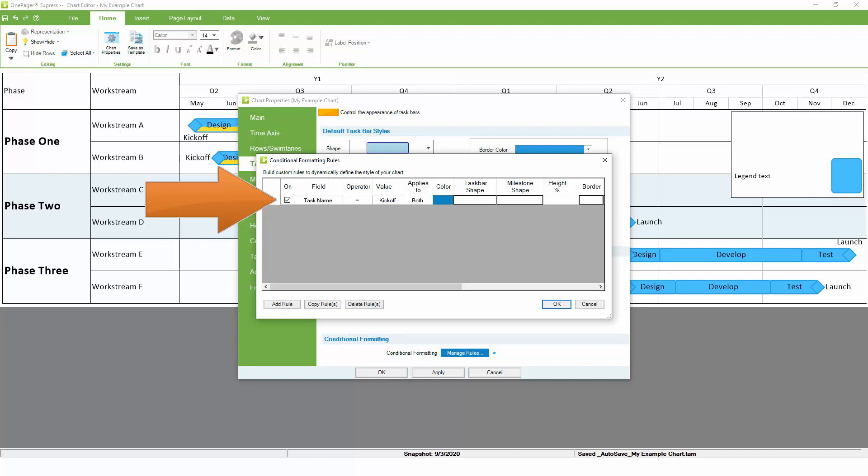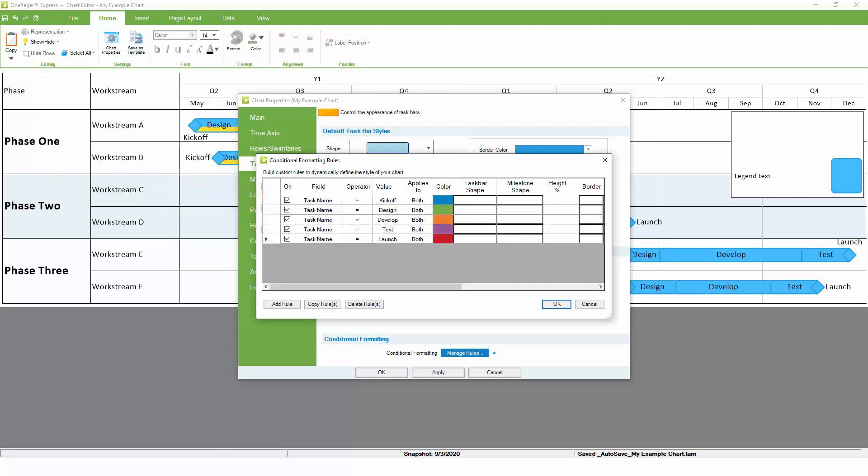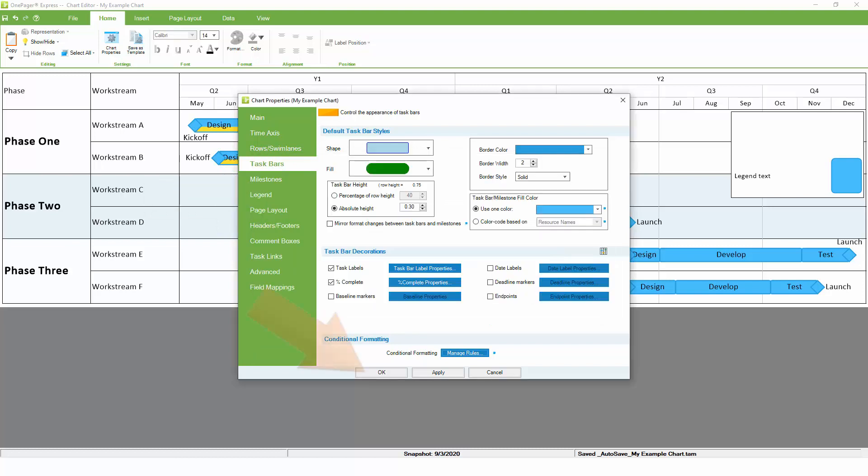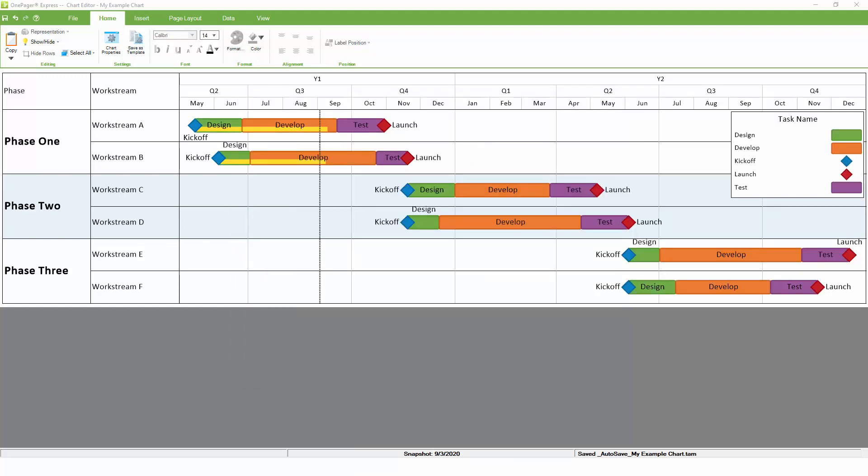Each of our work streams represents a sequence of five repeating tasks and milestones, so we can set up five rules to assign a different format to each family of tasks. For example, this first rule states that anything named kickoff should be blue. We can copy that rule four more times to capture the other conditions. Now we have a unique color for each type of task.